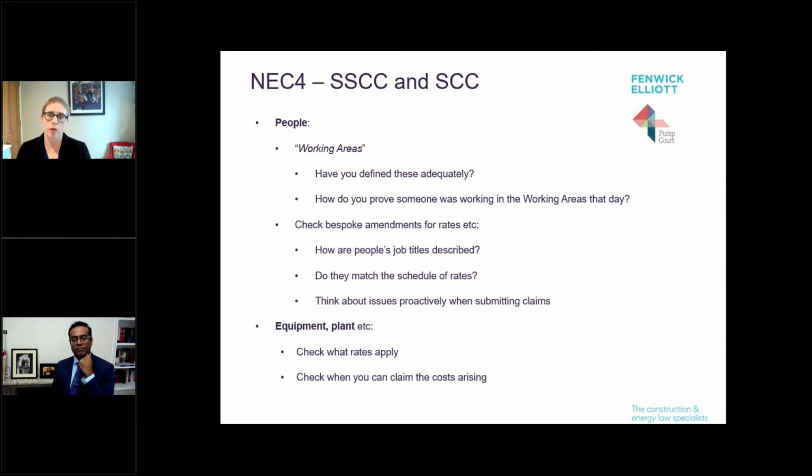And the classic one is, oh, we've got an amazing electronic signing-in system. It's brilliant. It's faultless. Was it working for the duration of the project? No. We shut it off for about 3 months during COVID because we couldn't do that. Excellent. Have you got signing records? Yes, somewhere. So you just need to think about how that works in practice.